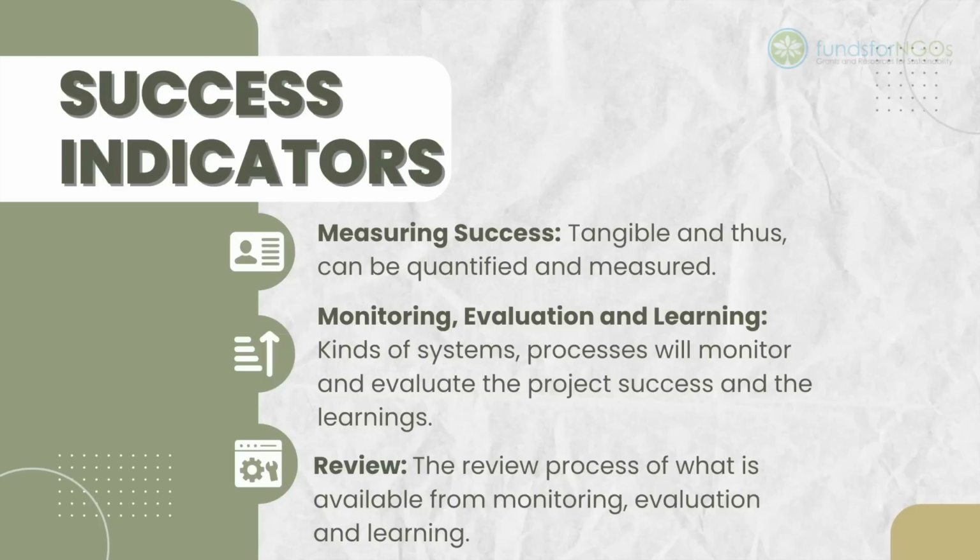Monitoring, evaluation and learning. Describe what kinds of systems and processes will monitor and evaluate the project success and how learnings can be further available from the project. Periodicity of the monitoring process like weekly, monthly, quarterly, etc. must also be mentioned, and the person responsible for each should also be mentioned. If there are specific meetings to be organized for this, they must also be specified.